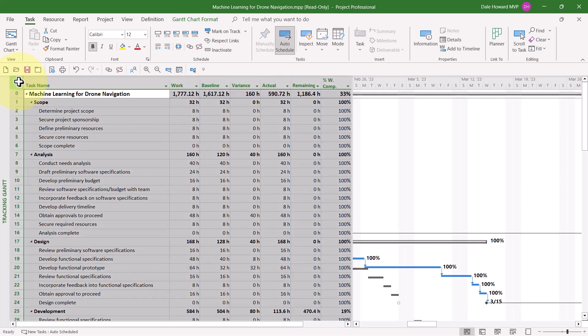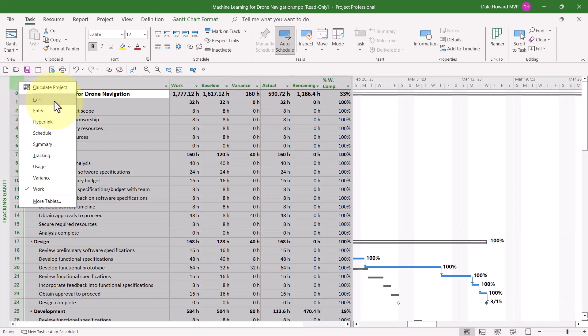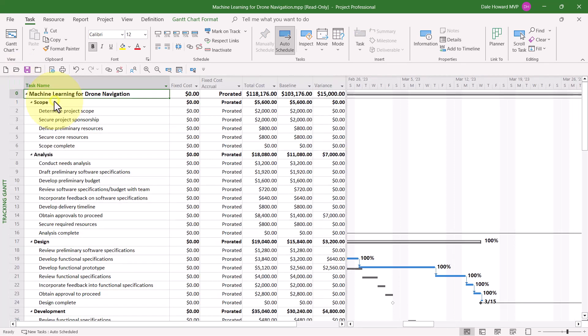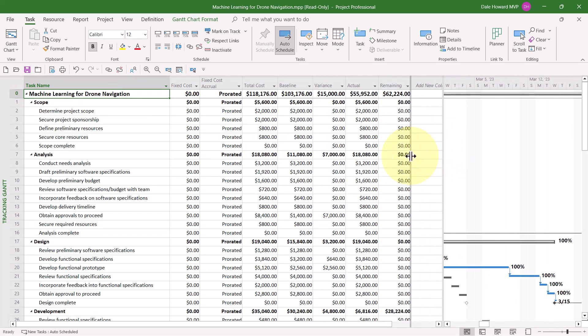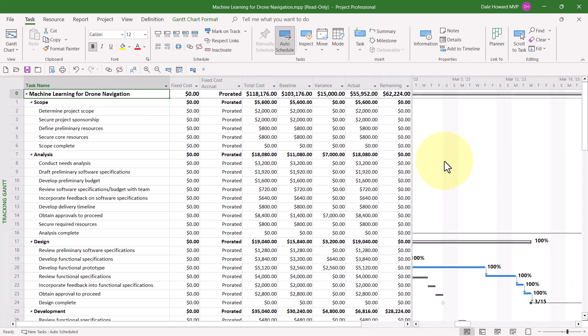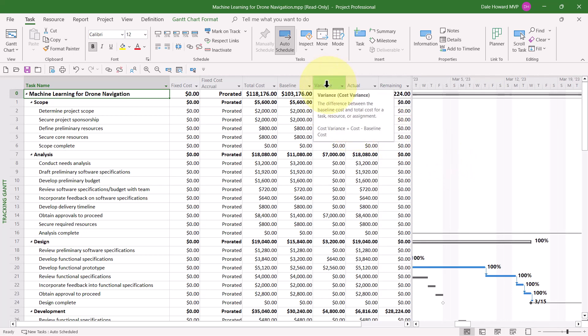To display this table, right-click on the Select All button and select the Cost item on the shortcut menu. Drag your split bar over to the right edge of the remaining Cost column. The column you're interested in, as you might surmise, is the Variance column. For Row 0, representing the entire project, this project is $15,000 over budget.